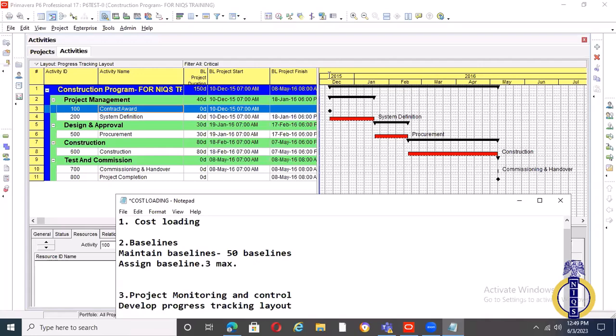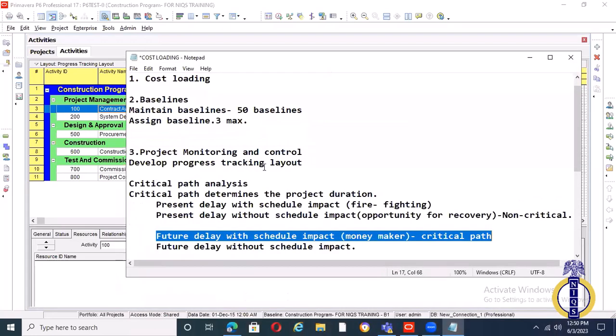That is activities that have zero total float. Are they correct? Yes, they are correct. But how do you now, as a planner, tweak that a little to help you monitor your projects? So you can decide that, if my schedule is in days, any activity that has 3 days float will be on the critical path. That means I have 3 days to dance Makosa before I run into problems, before the delays will start showing on the schedule.